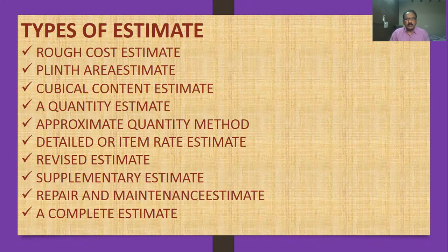Plinth area estimates. So plinth area estimate also, you know how to calculate. That we'll see in detail in the next coming topic. If you know, for example, plinth area cost 3,000 rupees per square meter, so for 1,000 square meter, how much? Like that, plinth area estimate.